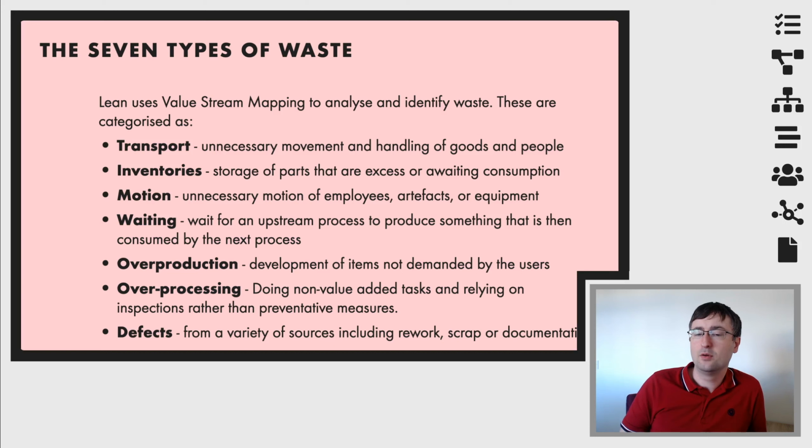And the bank say, yeah, but we didn't want that, because that 10 seconds that someone's waiting, that's 10 seconds they're spending looking at our adverts. So the gold plating that the developers had put in actually backfired in that place. So unless you're being asked to do something by the client, you probably shouldn't be doing it, okay?